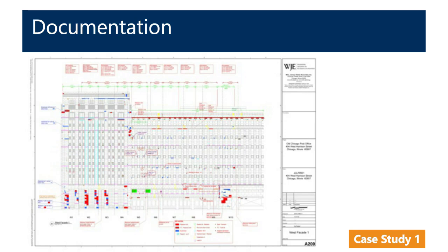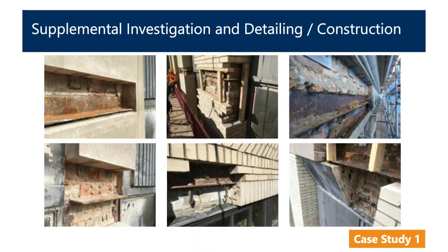It's also something that can be uploaded to FTP sites and shared, again, so that the owner, the contractor, and the AE firm are all on the same page. And the initial documentation, as you can see here, was kind of going up, identifying where repairs are, shooting it right off to the contractor. They could get back on the swing stage and start demo the same day. So again, kind of speeding up the construction process.